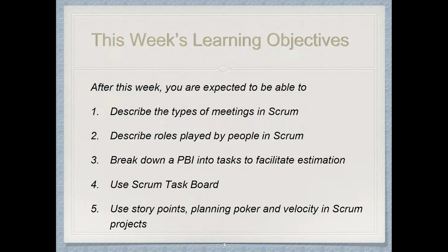Take, for example, if we want to write a screen, then maybe there's someone to design the screen layout, and maybe someone does the database work, and maybe someone does the JavaScript. So those I just mentioned are perhaps 3 different tasks just for one web page. And by doing that, each task becomes smaller, and we can do a better job of estimation.